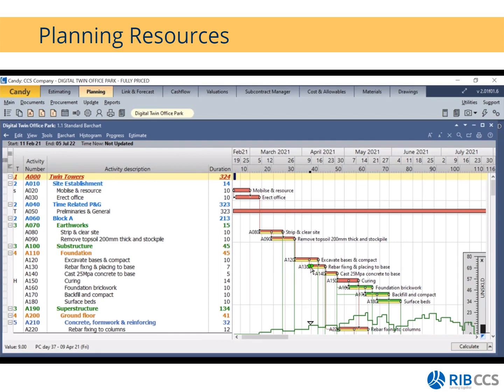But we put the option in your hands because, yeah, we don't really advise people to make use of resource leveling, but the option is there for you. So the option is there. You simply then go to the front of the bar, so it ignores the links. And if you go to the front of the bar, like I have it here, you will see the double-sided green arrow, and this will allow you to just move your bars accordingly.